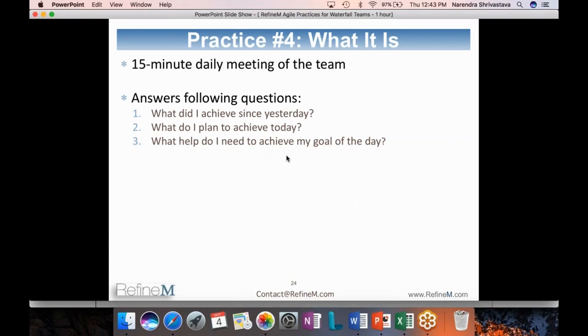And this is another very powerful way to identify showstoppers on a daily basis. So you don't have to come to a weekly meeting to talk about your showstopper. Sometimes somebody misses that meeting, then it's gone for 2 weeks, right? And if somebody else misses that meeting, then the communication, you know about communication channels. If there are 4 people, then 4 into 3 divided by 2, that's the number of communication channels, if you're PMPs. So sometimes somebody misses, then you create communication gaps, and that creates problems.